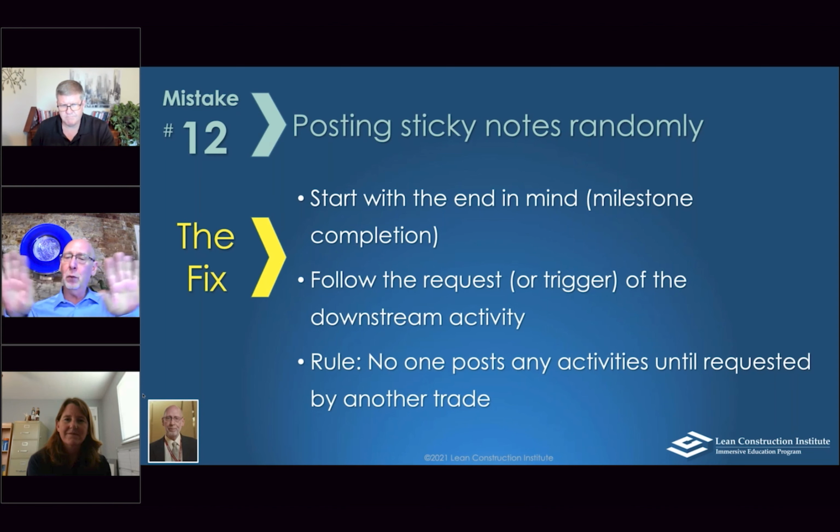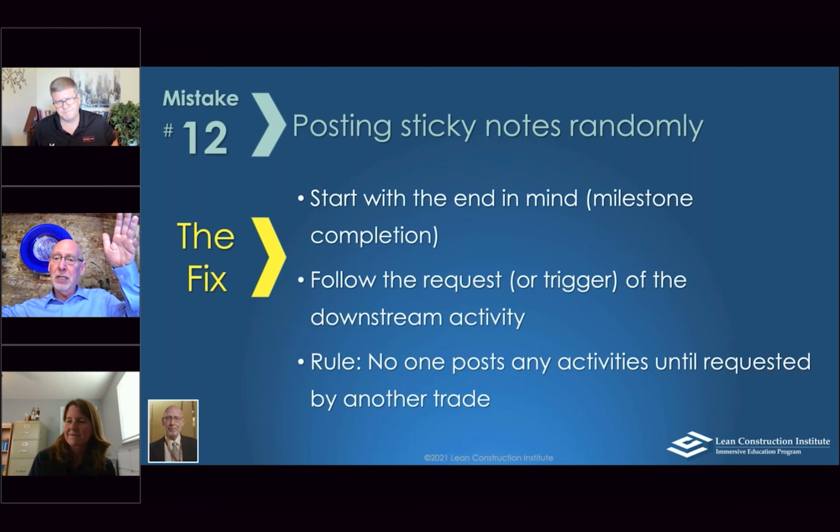But then when you get into the weeds of each deal, whether you're at the phases or at the weeklies, it doesn't matter, the interior of that changes. That's why, as both Julie and David said, understand that pull planning boards are living documents. They really are, and they change, and they are supposed to change. A constraint gets hit that wasn't expected somewhere, which causes a rippling effect all the way down the sequence over the six-week look-ahead into the phase plan, and that still needs to be translated to the phase plan. These living documents have to talk to one another, so the more accurate the information on them is, the more accurate your long-term look ahead and ability to make these commitments becomes.